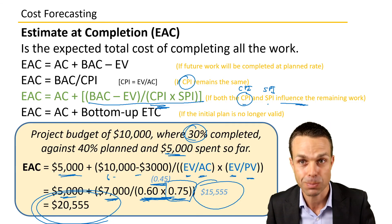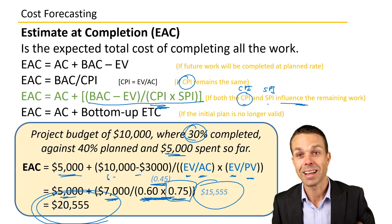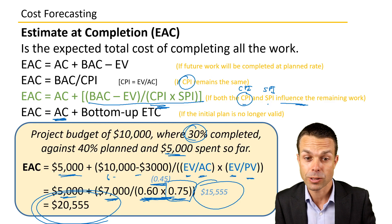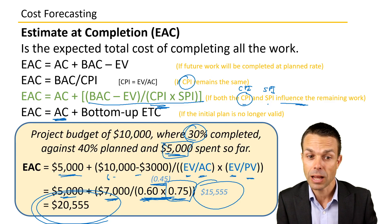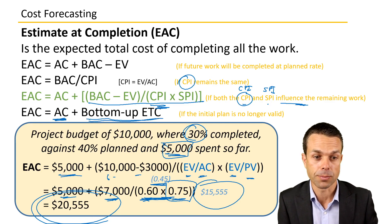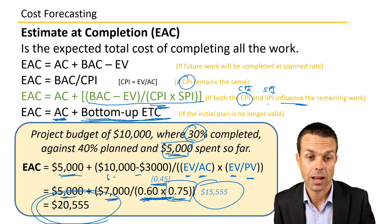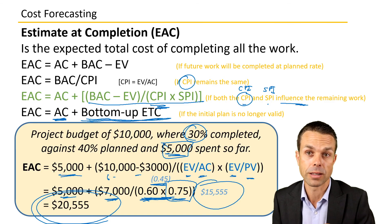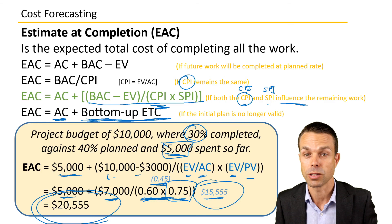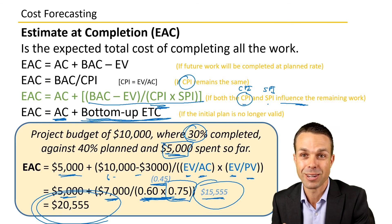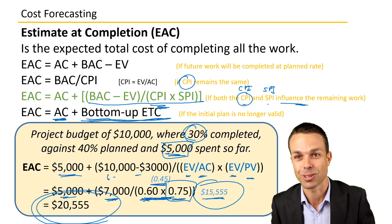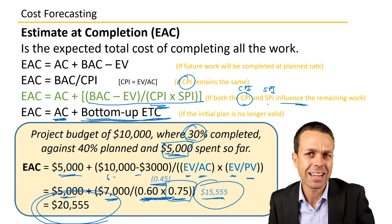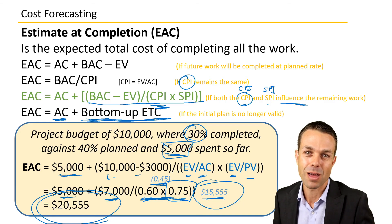Finally, you need to know that your EAC could simply be your actual cost so far ($5,000) plus a bottom-up estimate to complete. If you need to change plans completely and everything has gone off the rails, you re-figure all the remaining costs and add that to what you've spent so far. Those are the different ways to calculate your estimate at completion, which is the foundation for the rest of the cost forecasting methods we'll see in the next video.